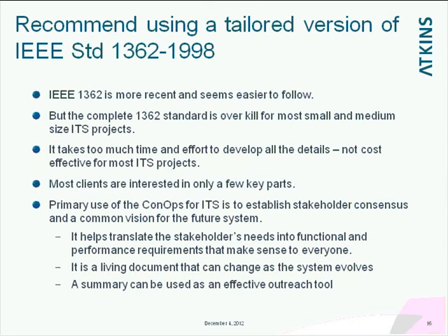So I think the primary use of a ConOps for ITS is to establish stakeholder consensus and a common vision for the future system. And that's where I found it to be very, very useful, in that I go out and listen to the stakeholders, record what they want, and then interpret that into a fictional system, a hypothetical system, and I write about it, and I write about how it would work. And then the stakeholders read about it, and they say, wow, this is great. This is what I was thinking, or, boy, I don't know what this is. I didn't even think I wanted this, or I don't want this at all.